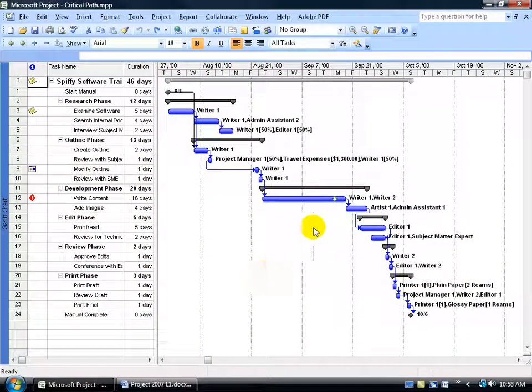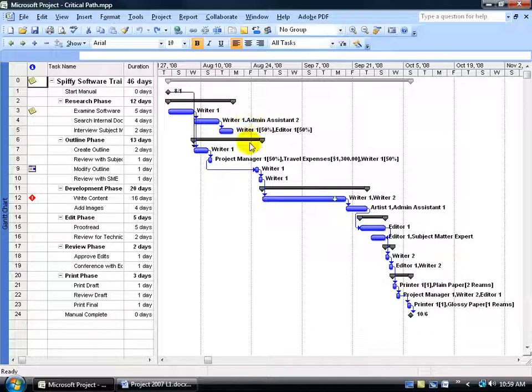A critical path is a series of linked tasks that determines the calculated finish date of the project. If you have a non-critical series of linked tasks that slips its date enough to affect the project end date, then it will become critical.